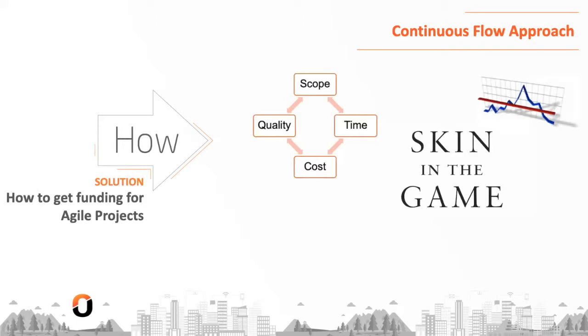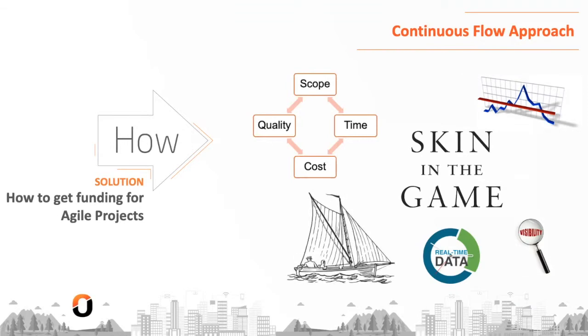Defining thresholds. Time-sensible thresholds must be set for each boundary. Visibility. Boundaries must be visible and accessible to the sponsor, finance, and stakeholders at all times. Data. Data must be accurate and collected automatically to avoid garbage in, garbage out, and to build trust in the visibility. And lastly, steering for the project. Using the data and insights you gather to adjust and steer the project's course. So let's talk about how we do these things.